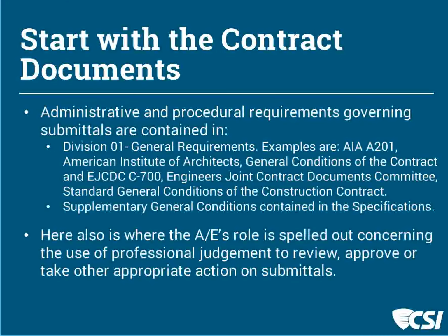Typically in Division 1, this is where the administrative and procedural part of submittals is covered, either within AIA documents, EJCDC documents, etc. So they can be discussed in the general requirements, but often designers will include a supplementary general conditions section in the specifications to drill down into more detail about submittals, and we'll talk about some of those details.